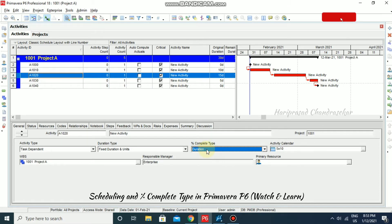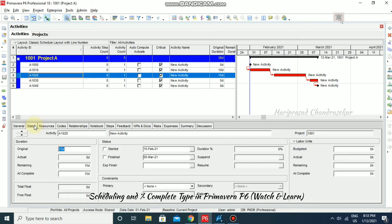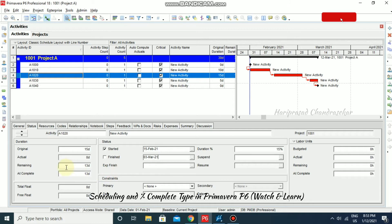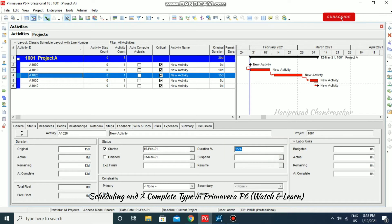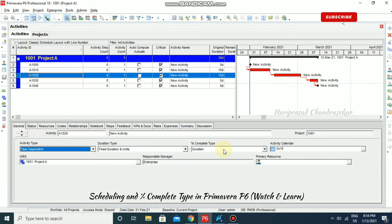With the duration completion type, go to the Status tab to start the project and specify the duration percentage. For example, if we input 15%, you can see the remaining and at-complete values update automatically. We've completed only 2 days so remaining is 13 days. If you put 20%, it automatically converts to 12 days remaining.